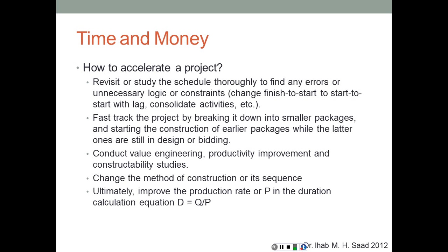starting the construction of earlier packages while the latter ones are still in design or bidding. So instead of designing the whole project and then bidding it and then building it, we can divide the project into packages, the foundations, for example, or the substructure work as one package, and as soon as it's complete in design, we can start bidding it and we can start building it while the superstructure is still under design.